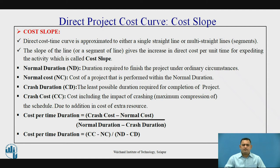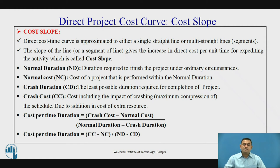The normal cost is the cost associated with the particular activity executed during the normal duration. The crash duration is the least possible duration required for the activity to complete. The crash cost is the cost determined when we crash the activity — it is the additional cost associated with the activity as we reduce its duration, since extra resources must be assigned. The formula for cost slope is: Cost Slope = (Crash Cost − Normal Cost) / (Normal Duration − Crash Duration), which helps in selecting activities for crashing.